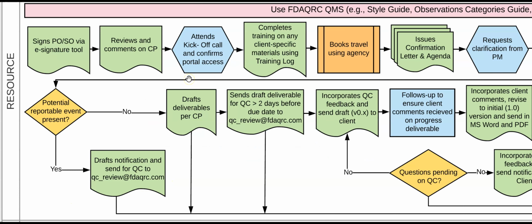The next step for the resource is to attend the kickoff call and confirm portal access. The kickoff call is attended with the project manager and the client to discuss the audit. The kickoff call is also when the client and resource would confirm if they are able to access the documents in the FDA QR Sync portal or any other document sharing tool being utilized for the audit. The resource uses the kickoff call to discuss the conduct of the audit and what the client can expect during the audit. The kickoff call is also used to ensure that the client and resource have a clear understanding of the client needs and audit expectations, timelines, and deliverables.